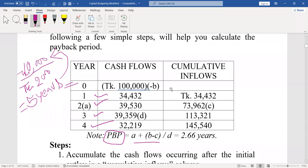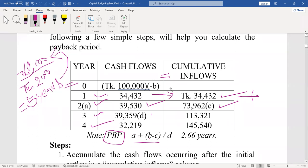To calculate the payback period, you need to calculate cumulative cash flows — cumulative addition or summation. First year: 34,432. Second year: 34,432 plus 39,530 equals 73,962. Third year: 73,962 plus 39,359 equals 1,13,321. Fourth year: 1,13,321 plus 32,219 equals 1,45,540.